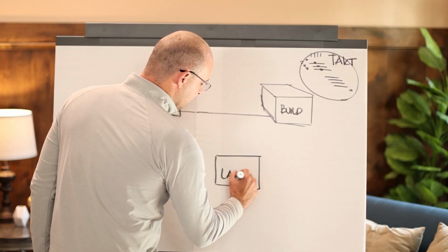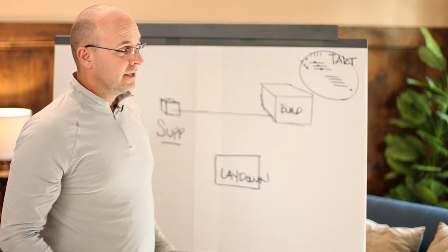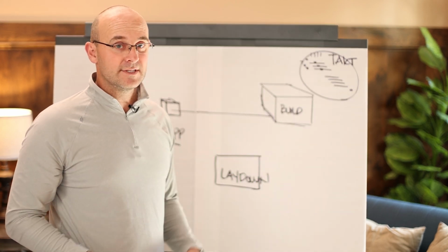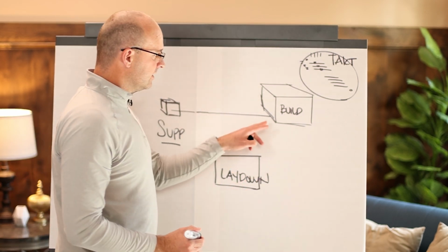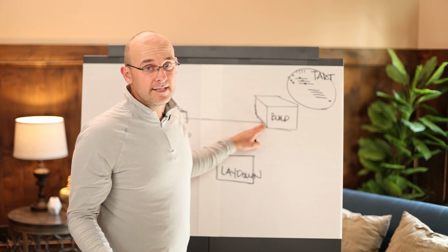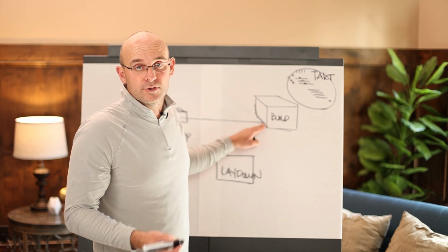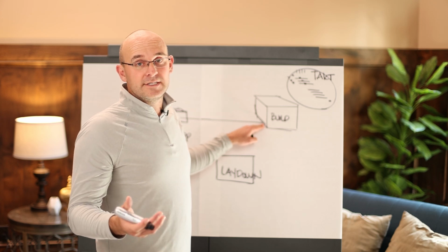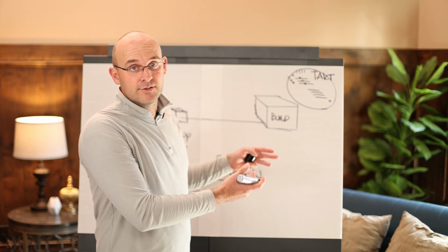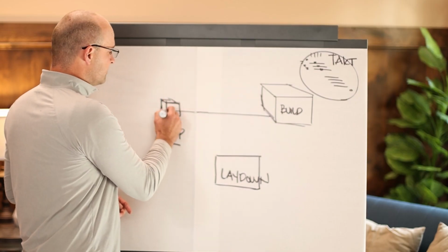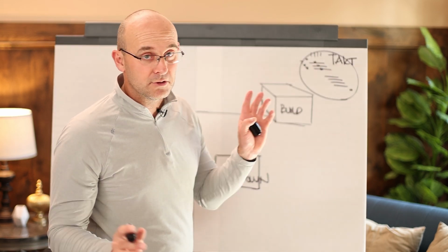And in lean construction, they use this too. They have supermarkets. They have areas where they store materials. They have Kanban systems. And so if you have, let's say, drywall, and you can get that real time, or you can order from the supply shop screws or small pieces of material with simple deliveries, just in time, hours or days beforehand, you can bring those materials from the supplier all the way to the building, to the place of work. Totally fine.